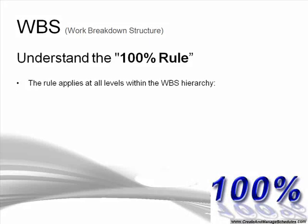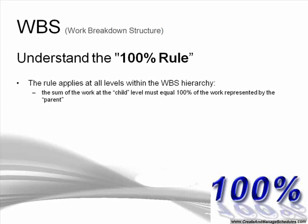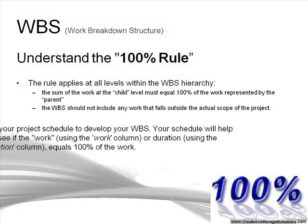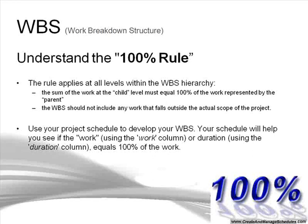The 100% rule applies at all levels within the work breakdown structure hierarchy. The sum of the work at the child level must equal 100% of the work represented by the parent. The work breakdown structure should not include any work that falls outside of the actual scope of the project. When you use your project schedule to develop your WBS, your schedule will help you see if the work using the work column or the duration column equals 100%.